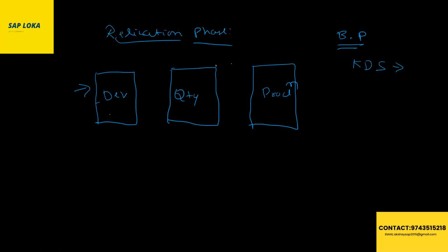In real time, whatever we are doing will not apply everywhere automatically; we need to transfer the data. Whatever we have prepared in the business blueprint phase, all this configuration we will do in the development server. Here the functional consultants will do our configuration, and technical people will do their configurations also here only. FI consultants will do their configuration, SD the same, all functional consultants will do their configuration, and technical consultants will do theirs. Once this configuration is done, we'll do one testing in the development server only. That is unit testing.